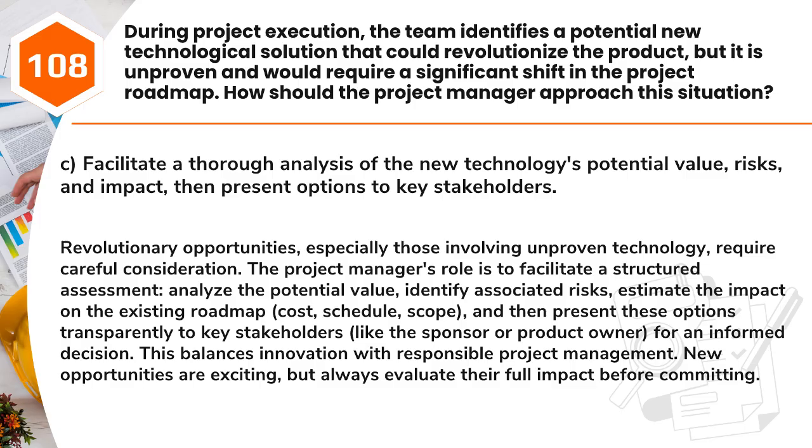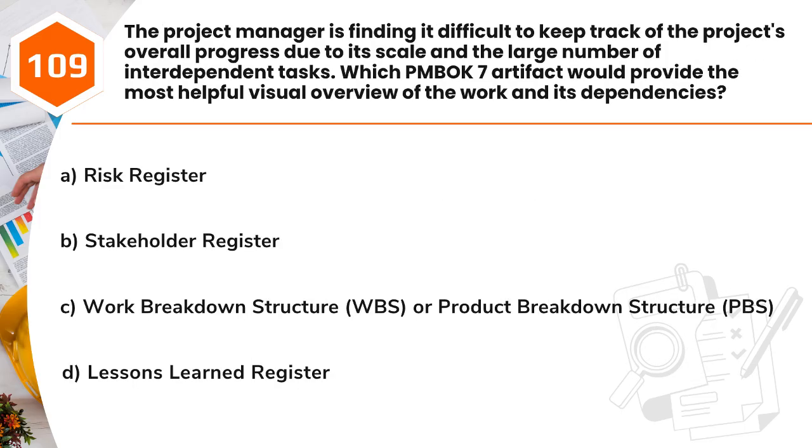The project manager's role is to facilitate a structured assessment, analyze the potential value, identify associated risks, estimate the impact on the existing roadmap, cost, schedule, scope, and then present these options transparently to key stakeholders, like the sponsor or product owner, for an informed decision. This balances innovation with responsible project management. New opportunities are exciting, but always evaluate their full impact before committing.